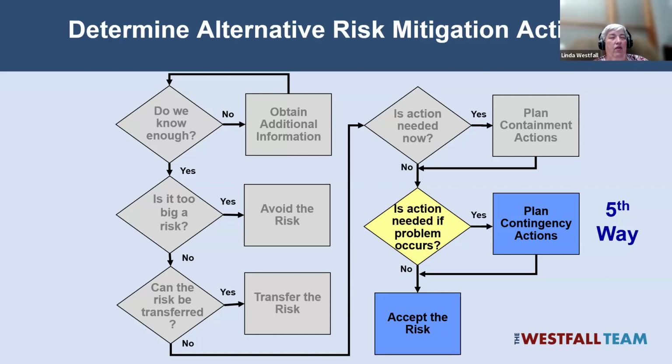So whatever mitigation actions you decide to put in place, you're always going to re-estimate the risk side and compare it with the opportunity after the mitigation actions. So decide, have you reduced it to an acceptable level? And there's almost always gonna be residual risk.